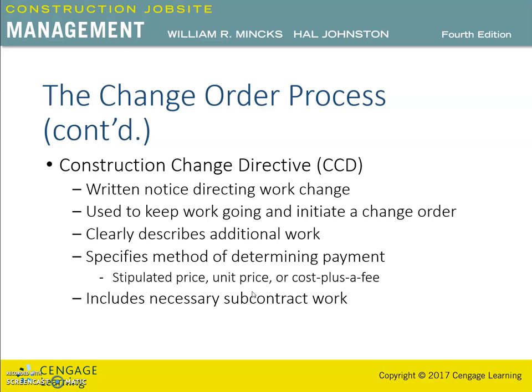The type of costs for the change order is usually stipulated in the contract documents, excluding off-site overhead, which is to be covered by the fee. The change order proposal will vary from one construction company to another, but the specific form will contain most of the same information.